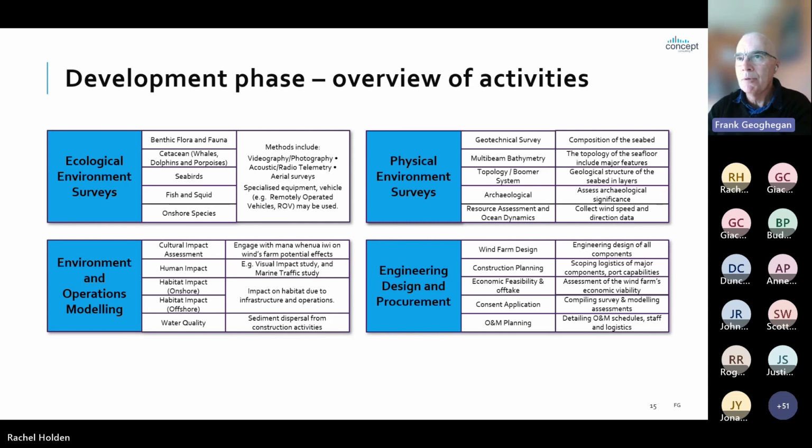If you just looked at environmental, for example, you can imagine the sea environment. There's subsea conditions, there's the topside conditions, there's the flora and fauna, and more like the seabirds, fish, and the like. All these will need to be studied with some degree of accuracy to assess the environmental impact, and that in itself, being out where it is, requires some very high-tech equipment: videography, acoustics, subsea surveys, work with ROVs. Currently, there is a floating LiDAR that's been placed out to sea to gather the wind, wave, and current conditions. So we'll touch on that a bit later on.